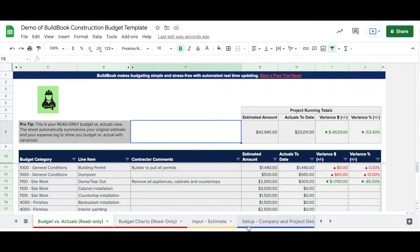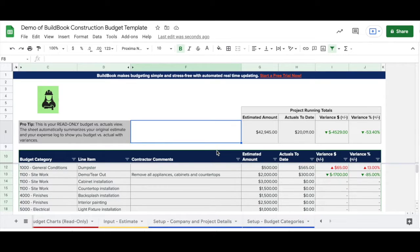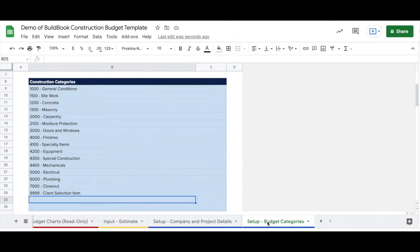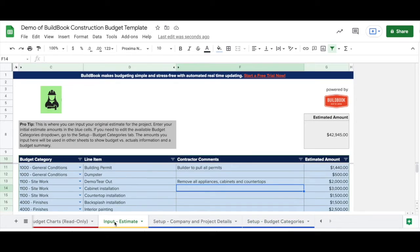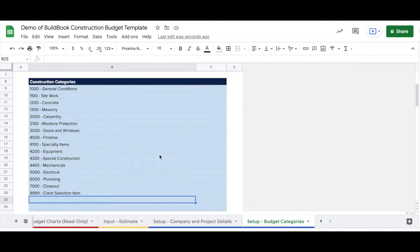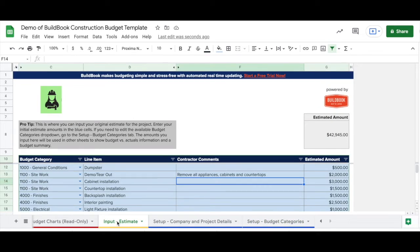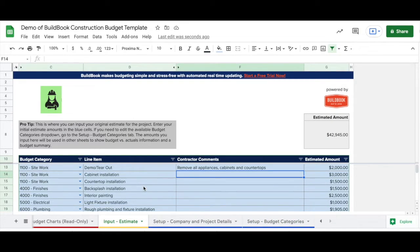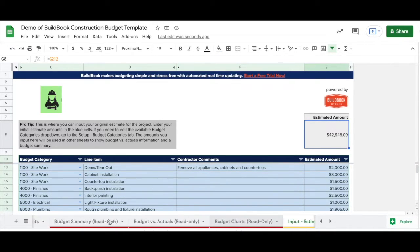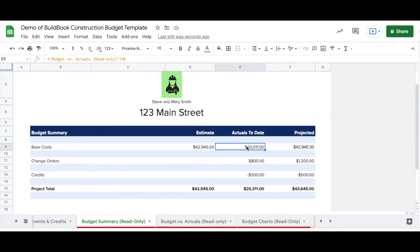You can attach them to emails for monthly or quarterly recaps or invoices. So far I've talked about how to track your budget once a project is underway, but what if you still need to set up the initial estimate? Not a problem — the template offers additional tabs to help create the estimate. You can jump right into the input estimates tab and itemize all the line items required for the job. If there's a category you need to add, use the budget categories tab to manage them, then go back to your estimate tab to complete your line items. The project totals will automatically be pulled right into your budget summaries.